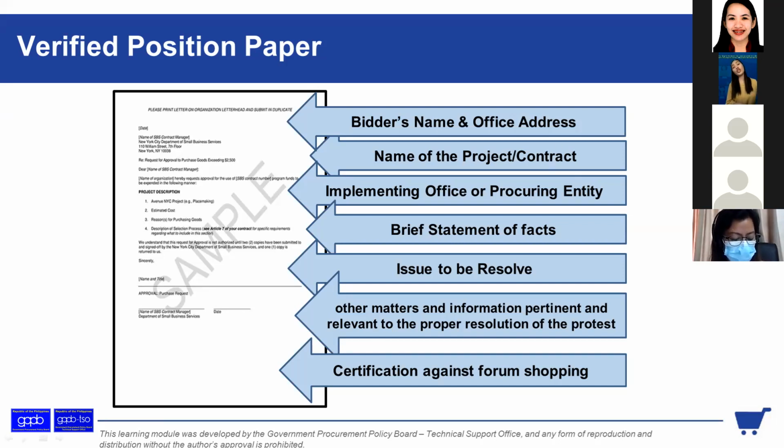Bakit walang cure? Kasi sa court kasi meron kami tinatawag na leave of court to cure our defects. Pero sa atin kasi wala kasi yan eh. Sa HOPE, hindi naman court si HOPE eh. Nag-exercise lang siya ng quasi-judicial function, no, for administrative sanction. So the resolution of protest, no, if denied yung request for reconsideration, may file na 7 calendar days to protest. HOPE shall also resolve the protest within 7 calendar days from receipt thereof.